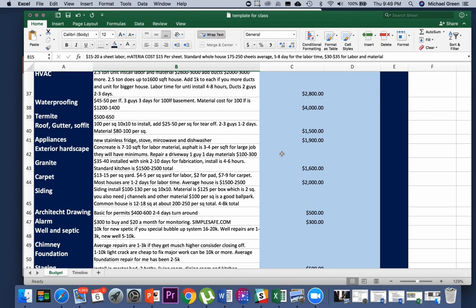And if you got to do all new driveway and all new walkways, you could spend anywhere from $3,000 to $5,000 to do concrete. It can be pretty expensive. So for the most part, we try to save that stuff and just get it into an acceptable repair condition where people are happy with it.